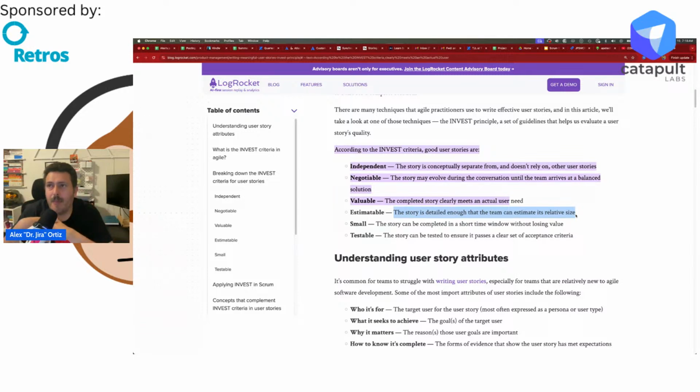Well, you've got to be specific there. You've got to be very conscious of the fact that if you're going to divide the work between 2 people, then maybe you want to divide the story into 2 stories so that you do have the appropriate estimation, right? Because I just see way too many people estimate just the development part, but they expect the entire life cycle of that story to be completed within the sprint.